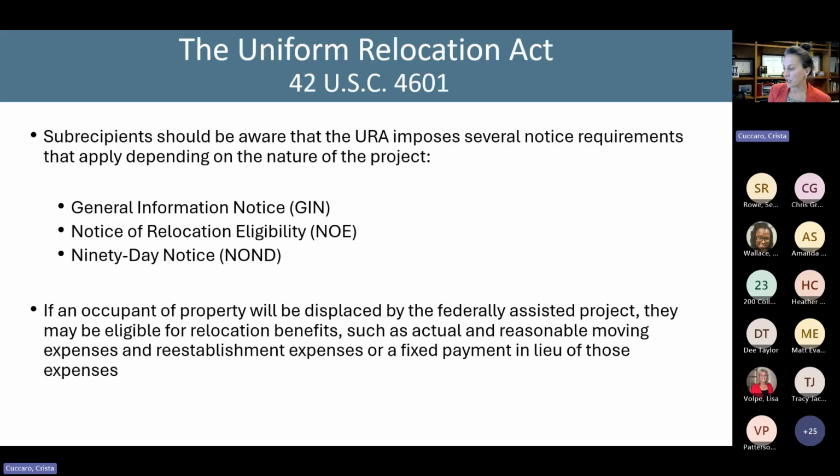Then, as I've already mentioned, if an occupant of the property is going to be displaced, then they are eligible for those relocation benefits, such as actual and reasonable moving expenses and reestablishment expenses, or a payment in lieu of those expenses. Again, that's a whole big section that we find under the Uniform Relocation Act in terms of calculating what those benefits are, how we come up with those payments.